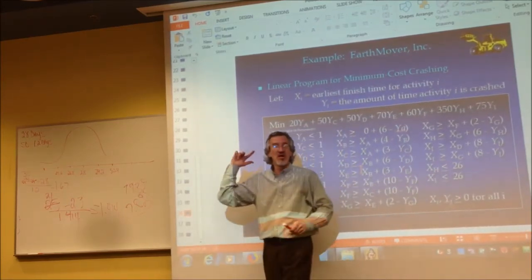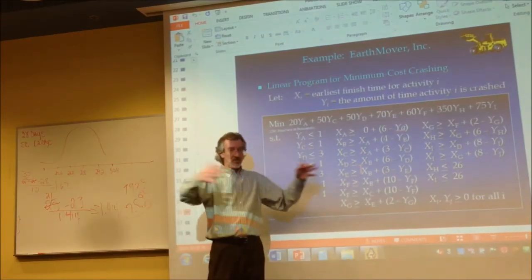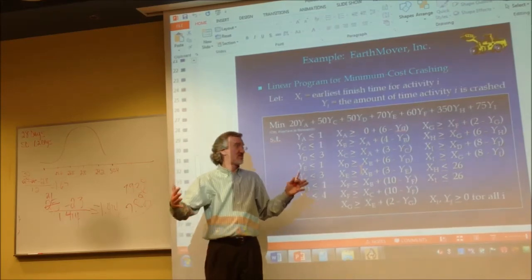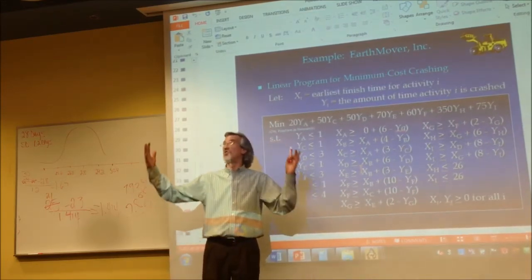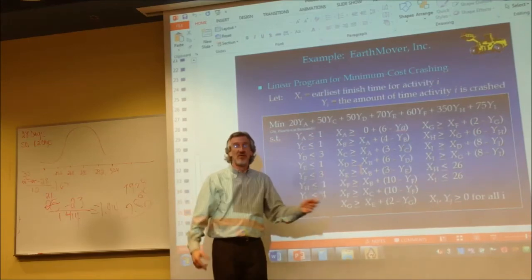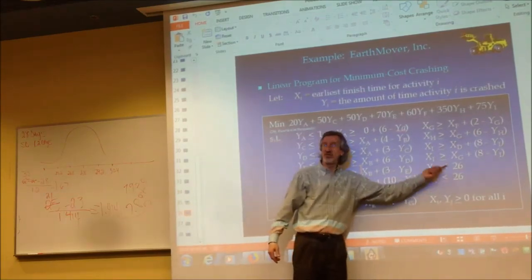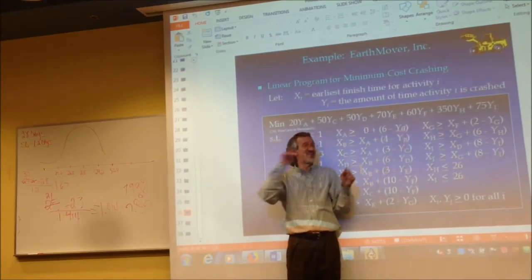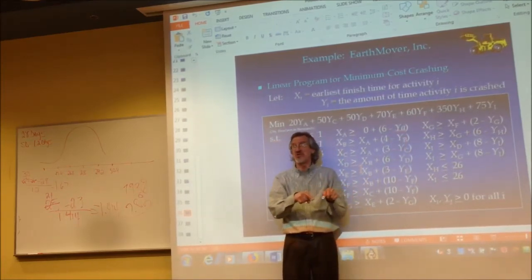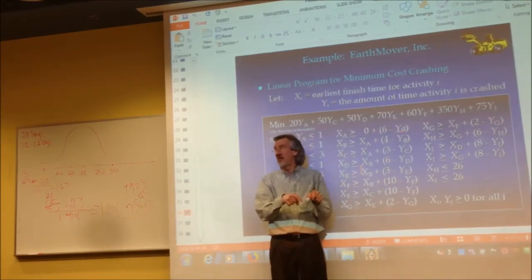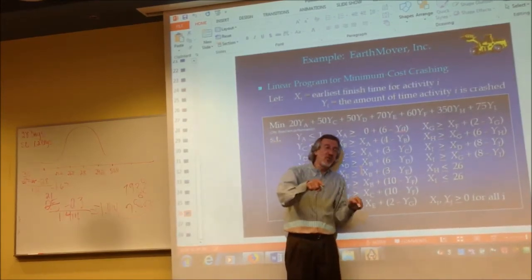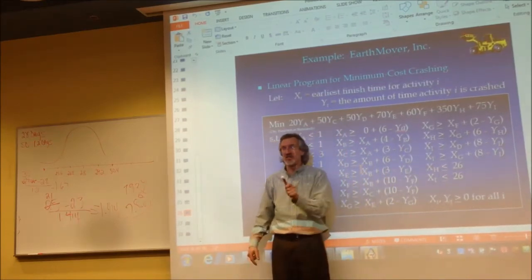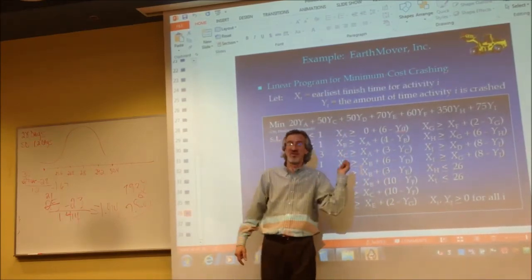So when we get to the story, I know that this activity was calculated to take longer than 26 units of time. And we decided that we need to get it done in a shorter period of time. I don't know what the expected time is, but we need to get it done in 26. You have to come up with how to get it done in 26 before we even start the project. And that's the real world right there. And you have to figure out a way to get it crashed to 26 units of time at the least amount of cost possible. That's what this does.